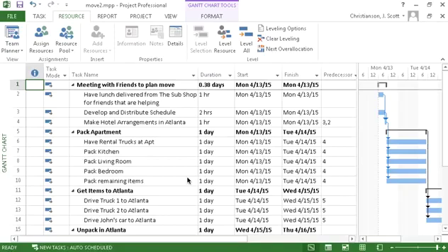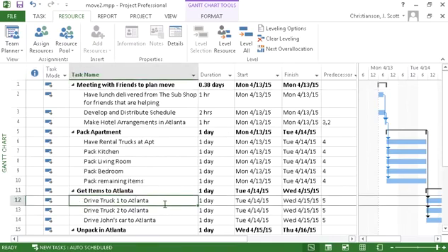Before we add resources to our various activities here, I want to point out a couple of things. One is that you'll notice that I have some of my activities dependent on a predecessor being completed, so everything in this particular set of activities is using finish to start relationships, so we aren't using anything special as far as the types of relationships here.